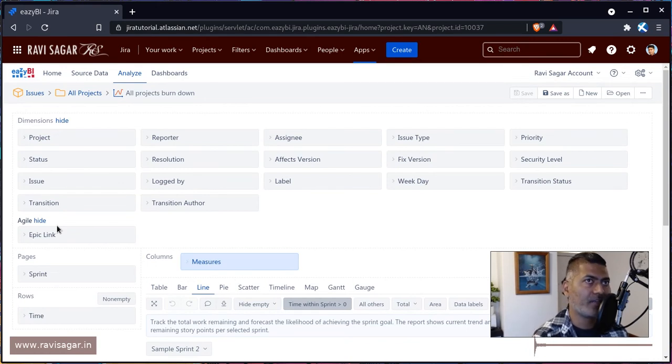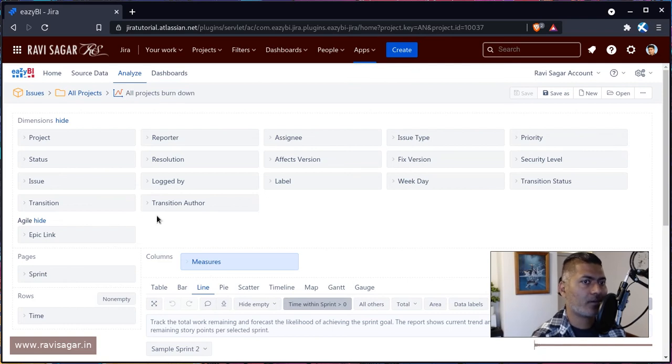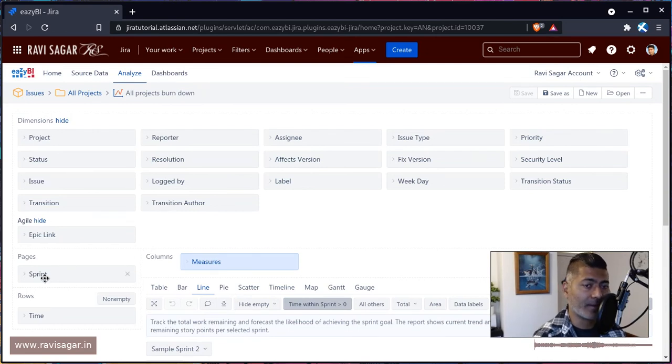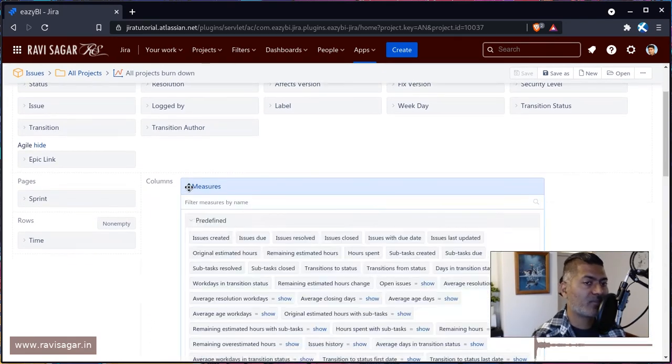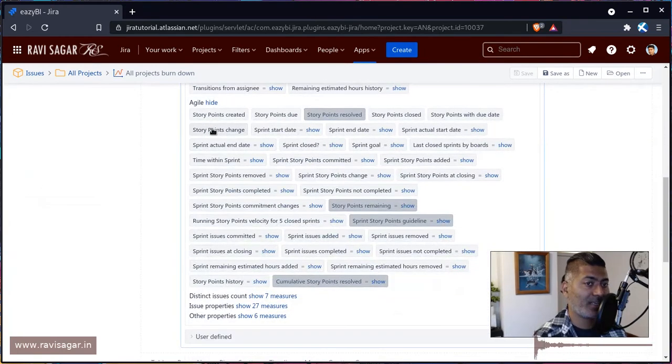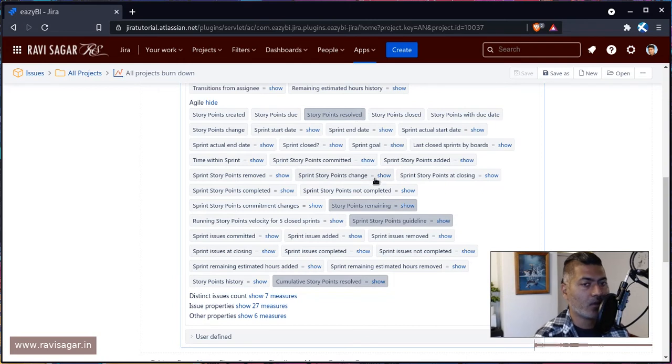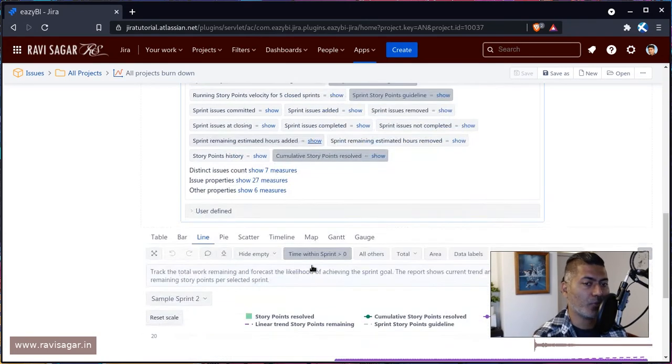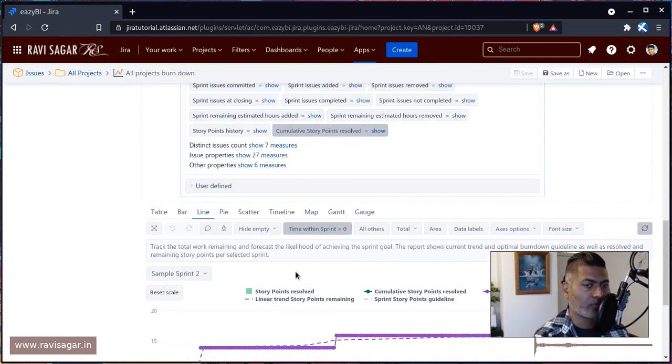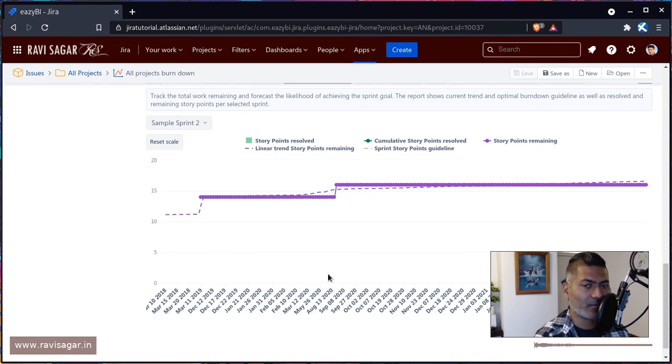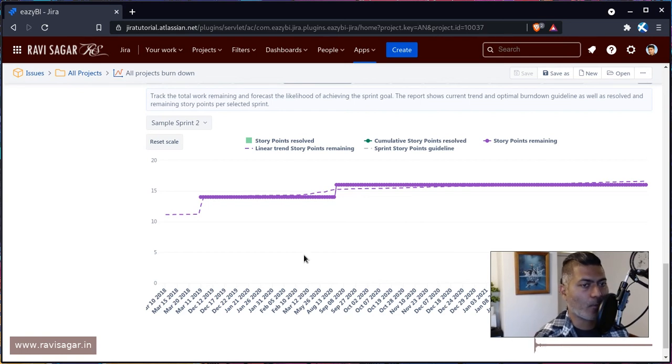If you remember when we did the import, there was an option to also bring in Jira software dimensions and measures. So make sure that is selected in the beginning, so that you can play with the sprints or sprint information. You do have some other measures that are Jira specific or Jira software specific like story point resolved, story point remaining. So these things are there for you to simply use. You don't have to worry. This report will give you within a couple of seconds a burn down or burn up report. And then of course, you can modify it based on your requirements.